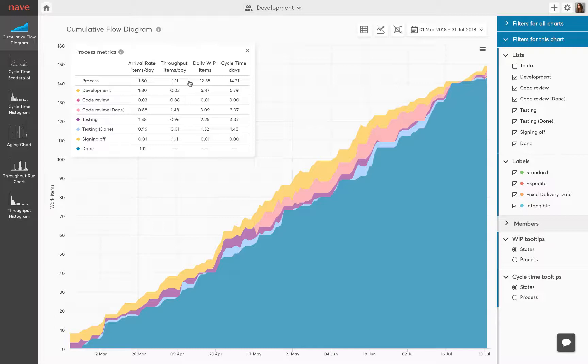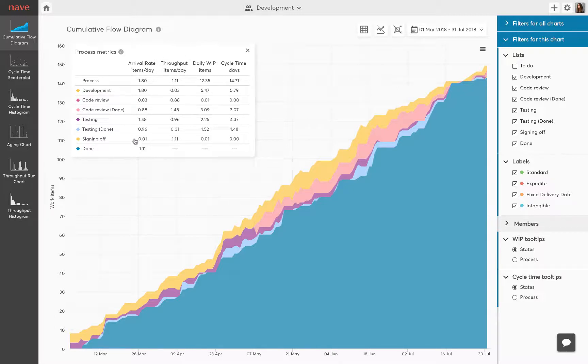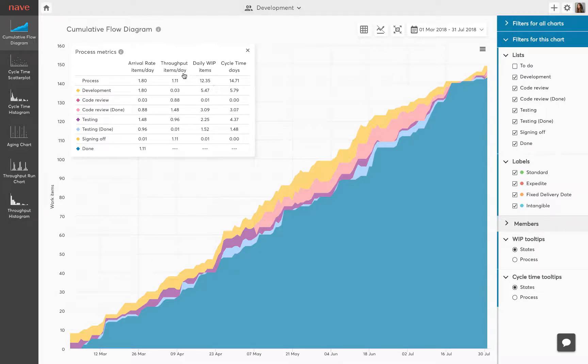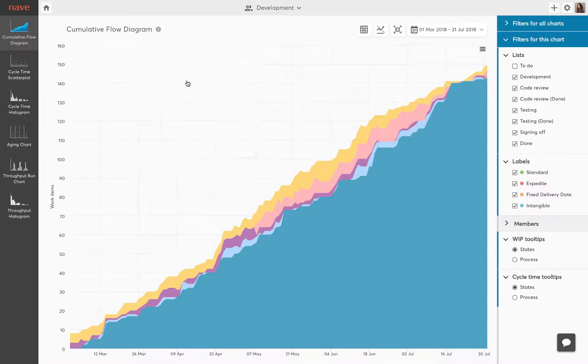You can evaluate your process health using the advanced process metric overlay for the whole process and per process state. Based on Little's law average cycle time equals average work in progress divided by average throughput. The more accurate the equation the healthier your process. If the math breaks down for you it is time to take a closer look at your workflow.